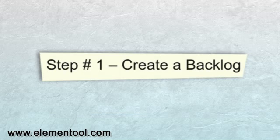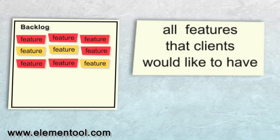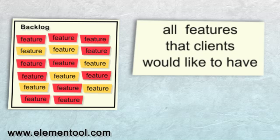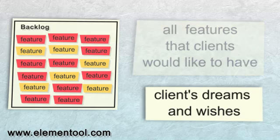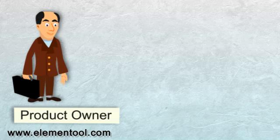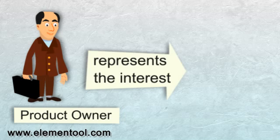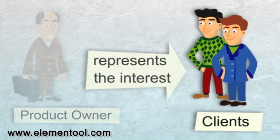Let's get started. Step 1: Create a Backlog. The Project Backlog is a list of all the features that clients would like to have as part of the complete product. It includes the client's dreams and wishes, but it doesn't mean that everything will be developed, as we'll see later. The backlog is created by the Product Owner, and the Product Owner represents the interest of the people who ordered the product, the clients.